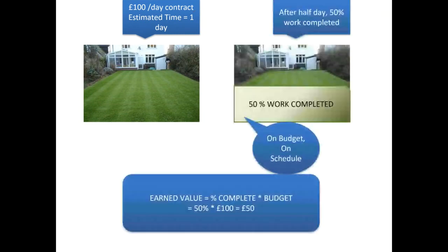So you do a contract with the gardener, and the contract is that you will pay £100 per day of effort, and the contractor has estimated that it will take 1 day to clear the garden. You view the progress of the work after half a day of the contractor working, and you see that 50% of the work has been completed.